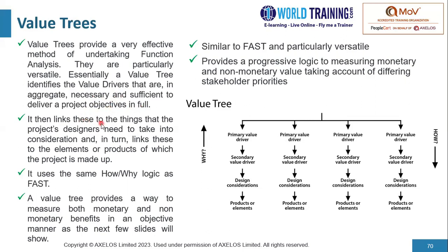It then links these to the things that the project's designers need to take into consideration, and in turn links these to the elements or products of which the project is made up. It uses the same how and why logic as FAST. A value tree provides a way to measure both monetary and non-monetary benefits in an objective manner, as the next few slides will show.